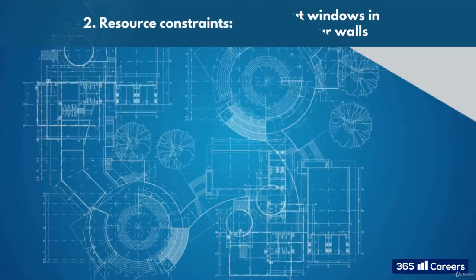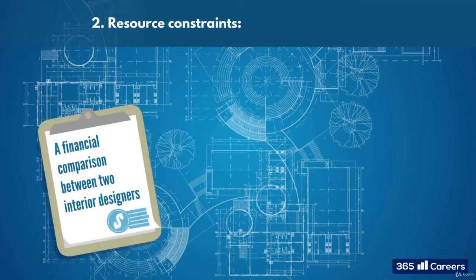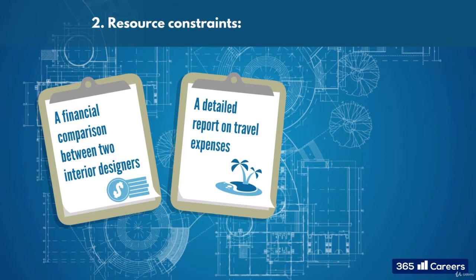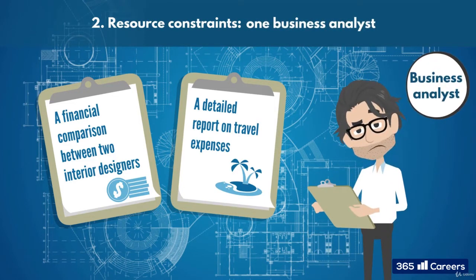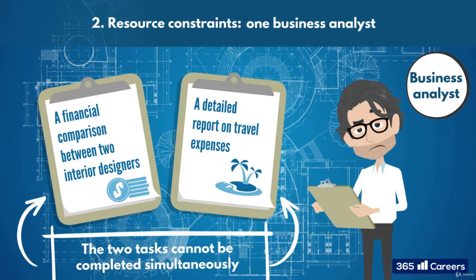Second, we've got resource constraints. Lack of resources can affect the sequencing of tasks. Let's say you have two work packages as part of your showroom project: one for performing a financial comparison between two potential interior designers, and another for preparing a detailed report on travel expenses. But you only have one business analyst and nobody else qualified to perform the tasks. The two tasks cannot be completed simultaneously; therefore, your business analyst has to finish one before they can start the other.